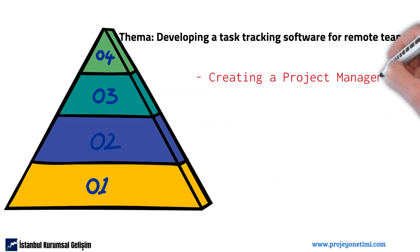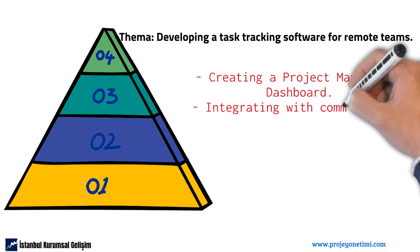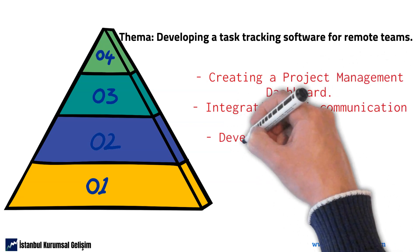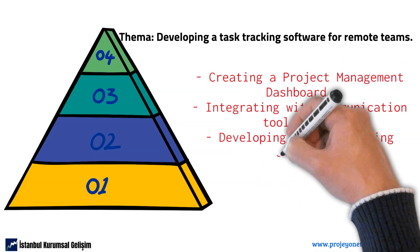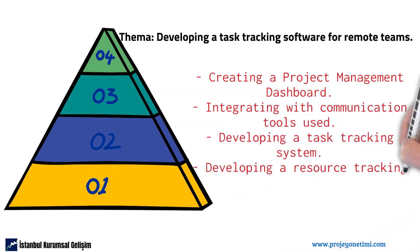Creating a project management dashboard. Integrating with communication tools used. Developing a task tracking system. Developing a resource tracking system. All of these elements need to be divided into multiple small stories to be delivered, but they are all related to the same theme. Epics can be delivered over several sprints and can be run by different teams.